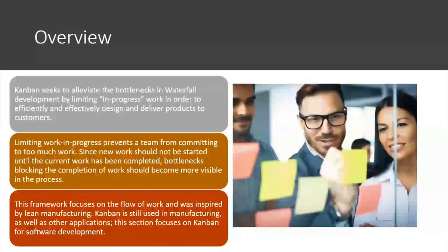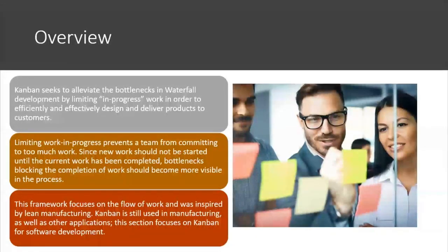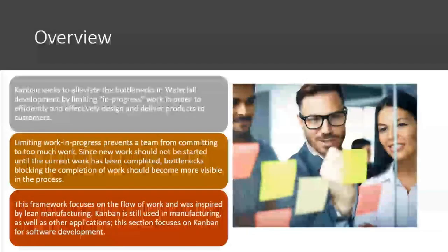Kanban seeks to alleviate bottlenecks by limiting in-progress work to efficiently and effectively design and deliver products to customers. Limiting WIP prevents a team from committing to too much. Since new work should not be started until the current work has been completed, bottlenecks blocking completion should become more visible. There's a term we use to describe what we do in our heads: we stop starting and we start finishing. This framework focuses on the flow of work and was inspired by lean manufacturing. Kanban is still used in manufacturing as well as other applications.